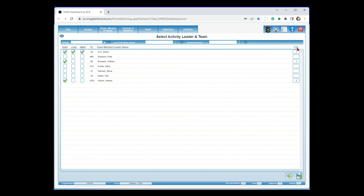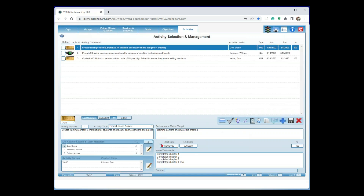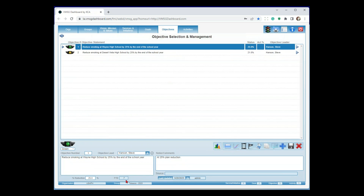In the top right, you can track the human effort involved in doing a particular activity — FTE or full-time equivalent, on a zero to one scale. Diane is at about 0.1 FTE — about 10% of her time — William about 10%, and Andrea about 30%. We roll these up the pyramid: at the activity level they total 0.5 FTE. Taking all three activities and rolling up to the objective, it's at 0.7 FTE, so the other two activities contributed about 0.2 FTE. This is typically used most during budgeting cycles.